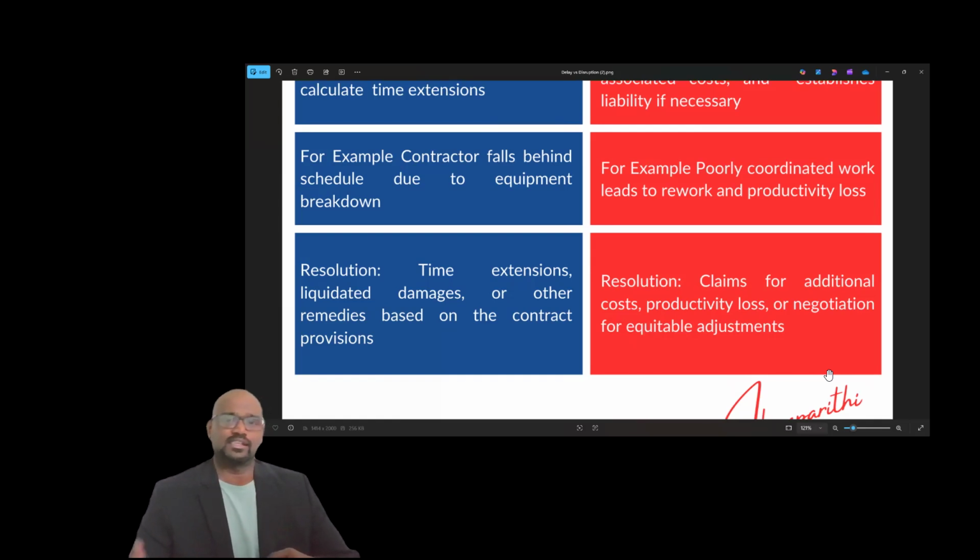So that will result in either you have to put 2 buses or you have to bring the people in 2 trips where you lost time. So that's the disruption. Similar disruptions occurred for a long time in getting approvals, in entering the site, in measuring the temperatures. So these are the things that will result in disruption, which is not easy to find using the normal methodologies we use for delay.